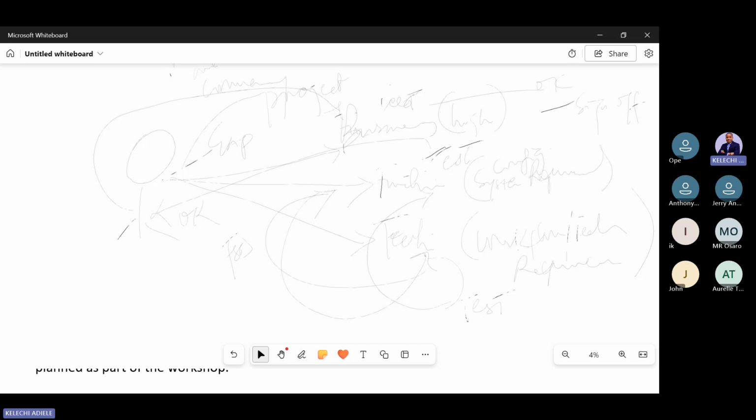With this, to advise you, okay, yes, it's within system requirements. Then he will take it up and do what we call an FSD and take it up with the technical team. The technical team will now configure, do some technical setup, do some programming, do some workflow setup. And if it's done, the technical team will test and send it back to the function. They are all testing in one environment, which is the dev environment, which has not gone live. So everything is happening in the dev environment.